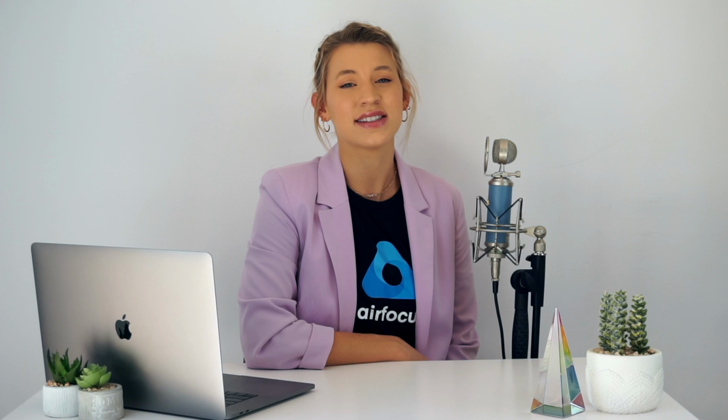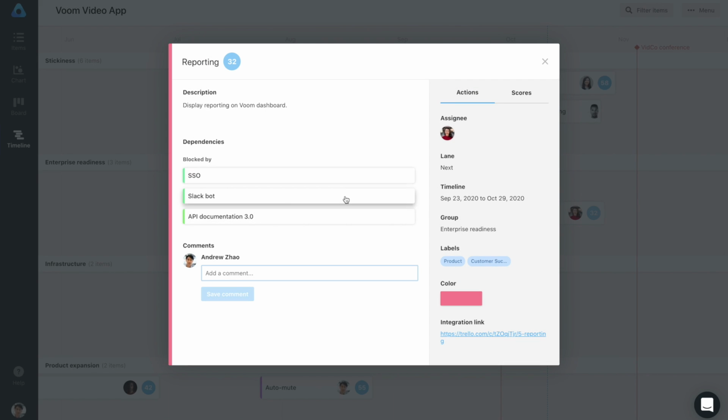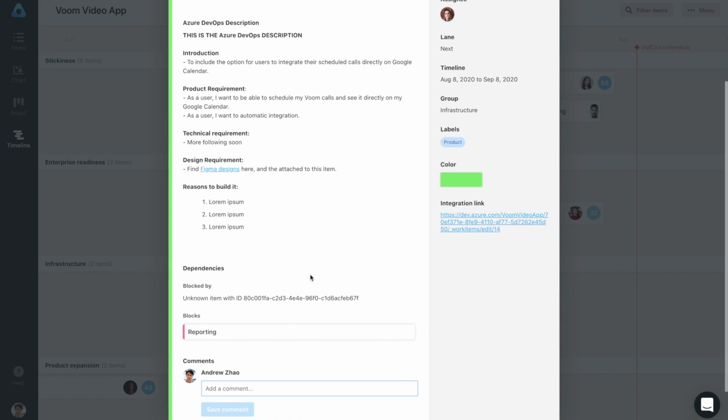Effective road mapping is one of the most effective ways to reduce any potential risks of dependencies. For example, say your design team has an unexpected delay and they need a few more days to complete some mock-ups. Development, QA, marketing, and sales will need to know about it well ahead of time in order to minimize disruption. This can be effectively handled with a dedicated product management and road mapping tool. This will enable you to communicate the progress of all dependencies across key stakeholders in real time.